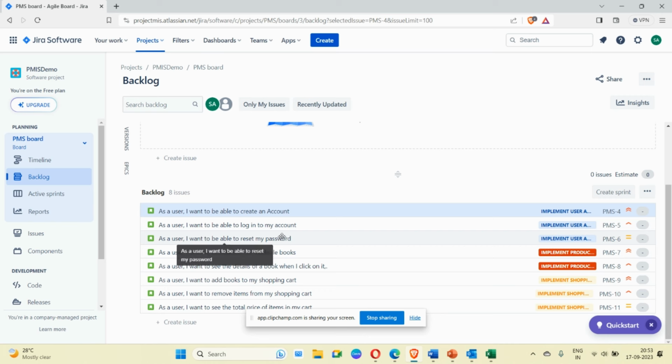And then the third story. Based on all this discussion, story points will be assigned. Story points are ideally a Fibonacci series number given to each story, and we assign a story point in a comparative way. For any story you start with one number, and all the other stories you compare against that story, how complex or how simple it is, and based on that you assign the next or prior Fibonacci series number.